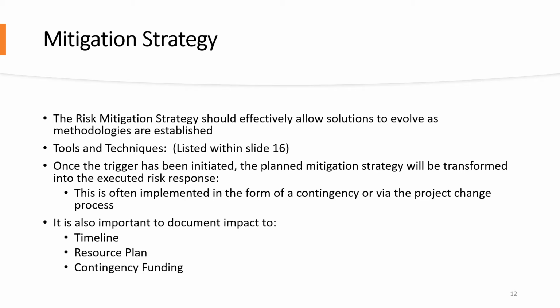A comprehensive mitigation strategy must include the development of a trigger. I will further delve into this topic within the upcoming slides. Lastly, it is important to document the mitigation strategy's impact to the project timeline, resource plan, and any additional costs identified as contingency.